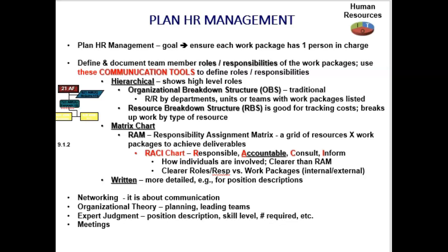The difference between a RAM and a RACI, you see the RACI in red below it. A RACI is a type of RAM, right? So they'll look similar, but they're not. A RAM is higher level. It's mostly at the work package level. A RACI is drilling down responsible, accountable, consult, or inform into the activity level, which is really at the schedule level. So I like a RACI better.